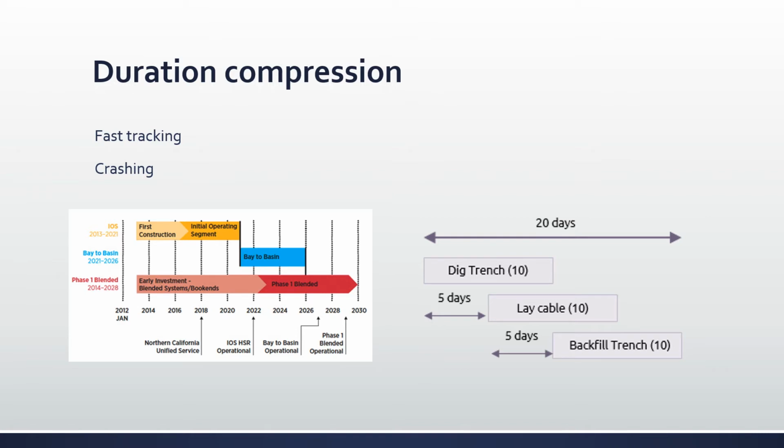So say you started a new project and have already gathered all the requirements. At this point, you could start with the design phase and only start with software development if design is ready. But if you need to fast track both processes, then you could start software development after first the most important designs are ready, and then continue to prepare later views while programmers implement materials they've already received. Although fast tracking may seem appealing, remember about the risks too, as you will have to manage several important activities at once. It's easier to make costly mistakes or sacrifice quality.